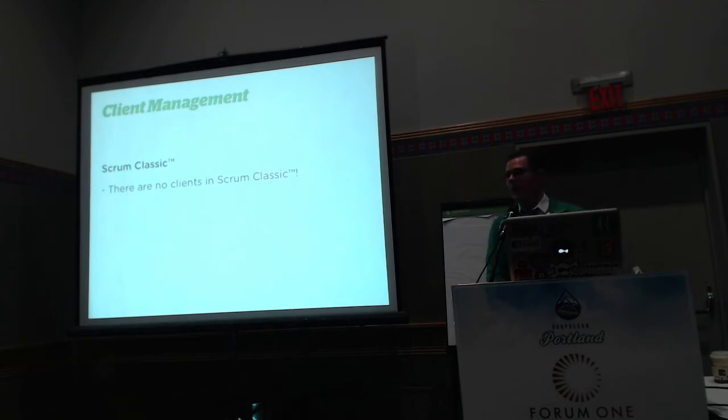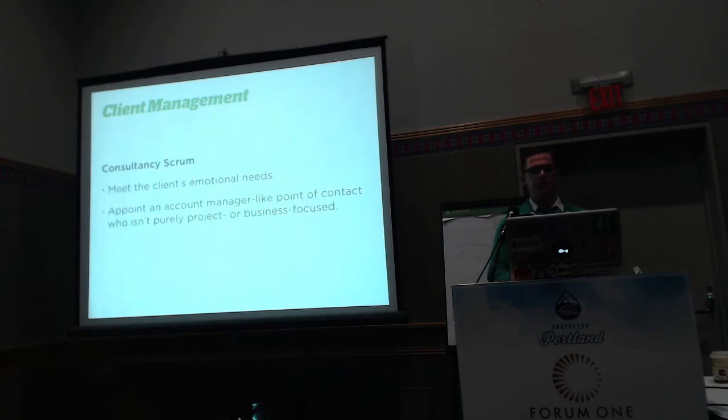So client management. In Scrum Classic, there are no clients, just stakeholders and a product that you have to deliver. So you don't have to worry about client management at all. But in consultancy, you have to meet the client's emotional needs. You have to appoint somewhere in your organization an account manager-like person who is not related directly to the project and not directly related to, say, the profitability of your business. So somebody who does client relations or account management, or a partner in the business, something like that.